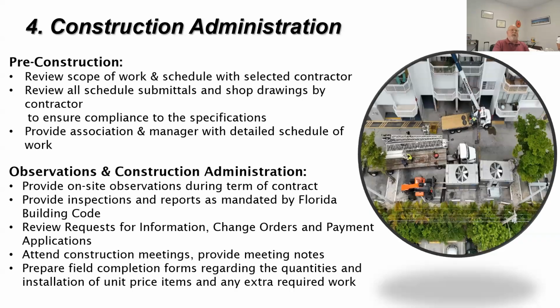But the cooling towers and rooftop unit replacements are probably two that need the most coordination and planning, especially here in South Florida, because when those go down, even if it's just to take them off to replace them, typically the building will not have cooling, at least for a short period of time. Again, as part of the assessment and communication, that's one of the things that we need to talk to the contractor about as well. During the planning process, do we need to bring in temporary cooling towers?